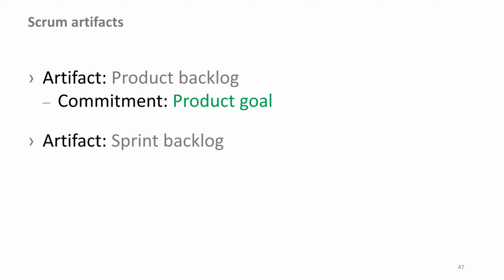The sprint backlog is a plan by and for the developers. It is a highly visible, real-time picture of the work that the developers plan to accomplish during the sprint in order to achieve the sprint goal. Consequently, the sprint backlog is updated throughout the sprint as more is learned. It should have enough detail that they can inspect their progress in the daily Scrum.